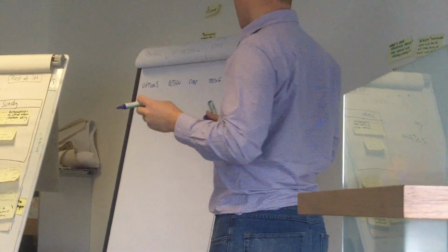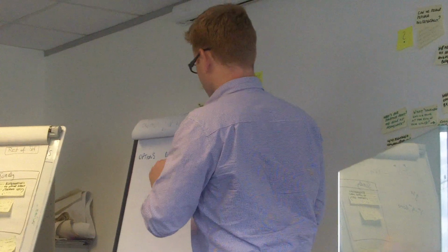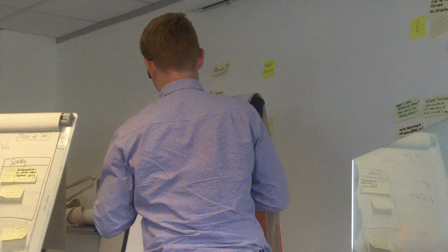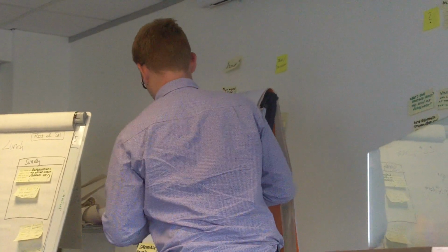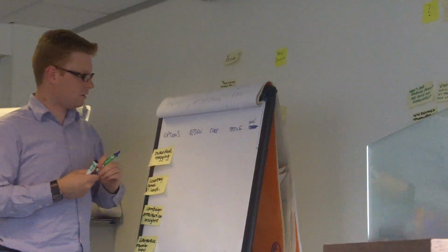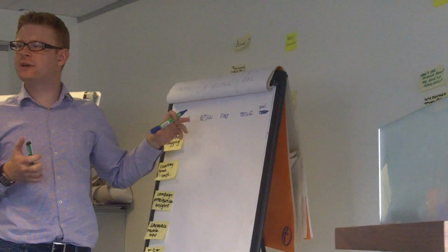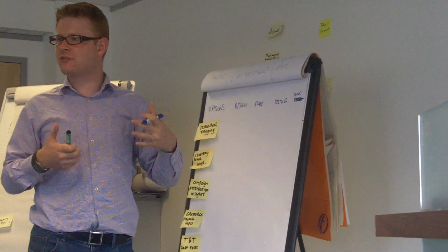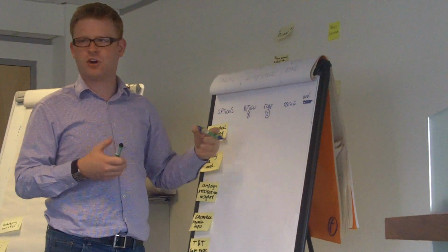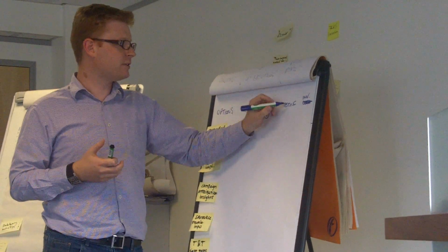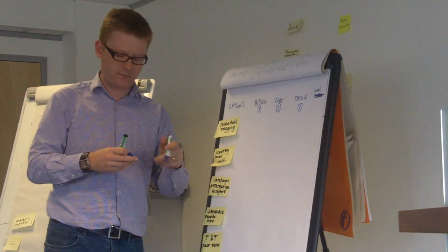So say you have a QA team, you have QA people, and you have designers and coders and that sort of thing. You can start with the same backlog you had before. Say you only want to be working on, you have one person in the office who can realistically take charge of this process. That does not mean that other people can't help, but this is generally their job. So you may say, we'll just have one of those at once. Then you have 2 of these at once because you've got maybe 2 or 3 developers. And you have one tester whose job it is to just manually explore everything. And then you have an inventory at the end, which is basically what's been tested.